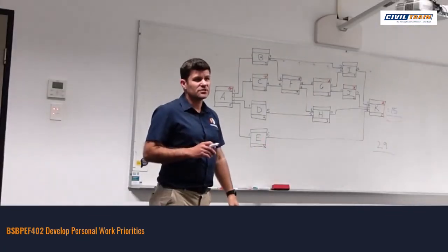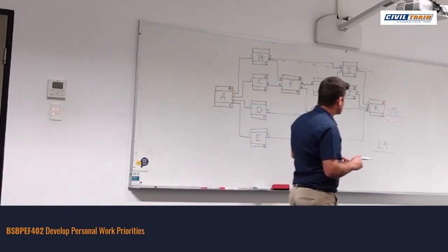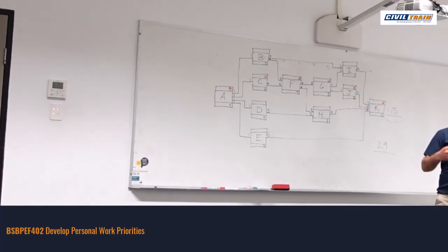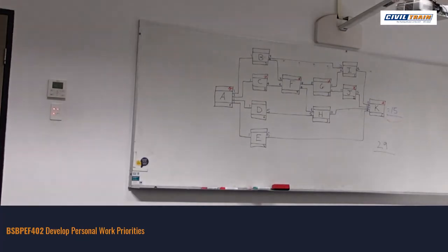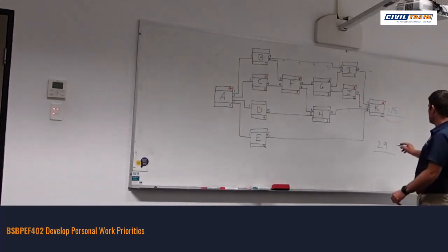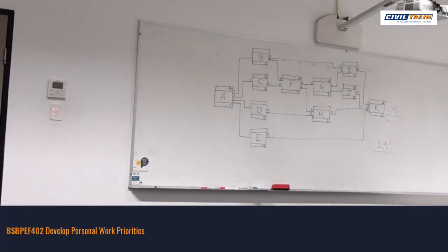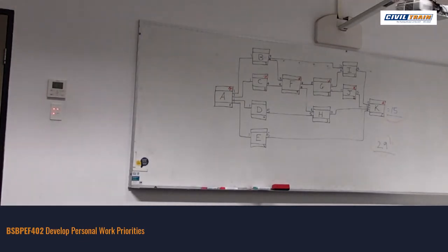Yeah. So a lot of time, depending on the duration, organisations might put a percentage on, or after, if it's every 15 days, they might add a day. You know what I mean? So you've got that buffer. We know worst case scenario, 29 days. So it depends on what was quoted or what was tendered for. But it gives you an idea of, potentially, behind the scenes of how things might be calculated.